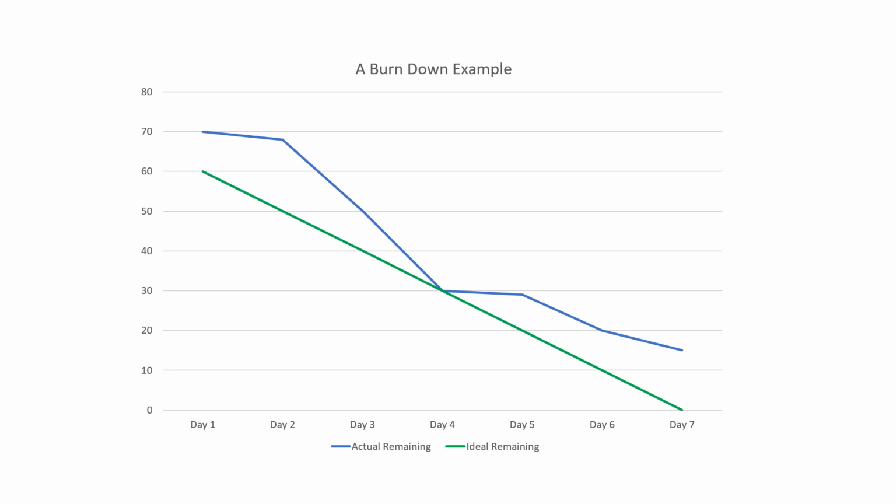And as we progressed, this blue line is actually showing the actual progress. So as the days passed by, the remaining work decreased and you can see the downward trends here till day 4, and then there is a kind of flattened line between day 4 and day 5, and the amount of work got further decreased, and finally on the last day of the sprint the team had around 15 hours of work left, but ideally they should have completed all the work.